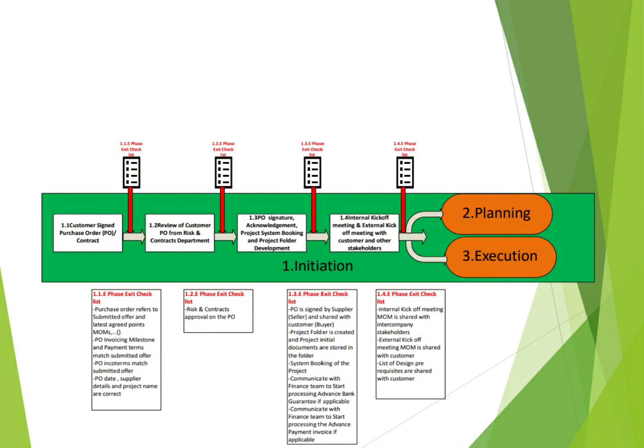Duration, value, all of this needs to be discussed with your customer, because finally your finance team will implement what you agreed with your customer. So you need to check this in your purchase order. So for example, the advance payment guarantee is valid up to the delivery of the project.